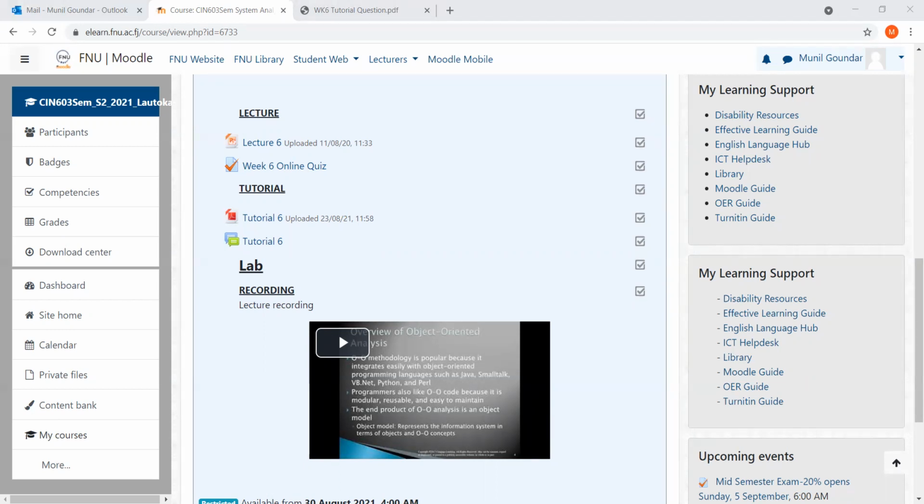Now, in your projects or in real life, you do not have activity A, B, C, D, E, F, G, H, but instead you have the real names of the activities. You'll notice your activity starts on the start date, the 2nd of July. Over here, you'll have a finish date as well. Nowhere in this question does it state whether you have 5 days as a working week or 7 days. If it indicates 5 working days per week, then you use that. If it doesn't state, generally you'll end up using 7 days.